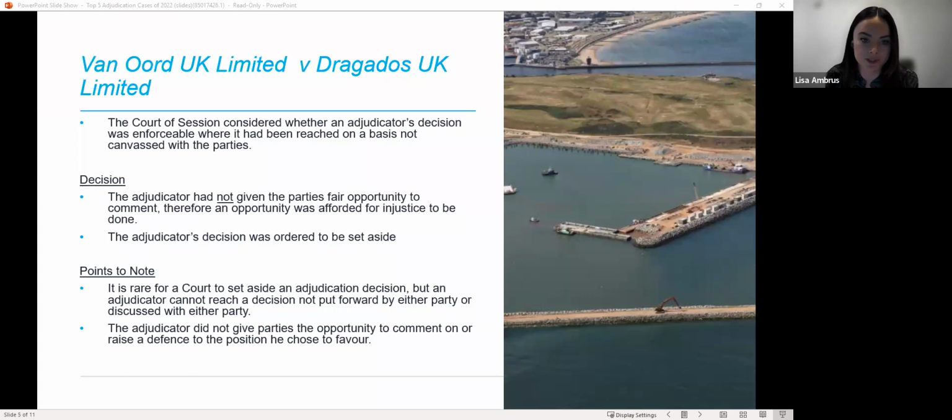In its decision, the court said that the line between an adjudicator going off on a frolic of their own and making legitimate use of their experience to analyse material which has been lodged and commented on by parties is not an easy one to draw. It must be remembered that a decision by an adjudicator on the second side of the line, that is, making legitimate use of their experience to analyse material, will be enforced, even if it is wrong. It was therefore irrelevant whether the adjudicator was right or wrong to take the 31st of July 2019 as a critical date. The reasoning was unclear, but that did not mean it was unfair.